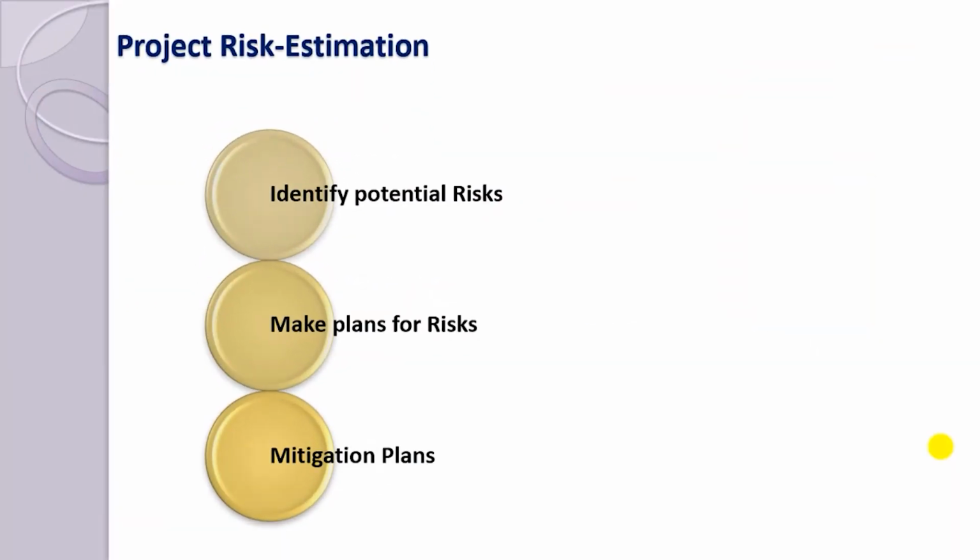So when we talk about project risk, what are the project risks? When we consider project risk, as we have told, in estimation you add contingency. So that's why you identify risk and add a certain amount of time in your estimation. Risk management is considered a part of the planning process, because when you are planning at the initial stages, there are a lot of issues.